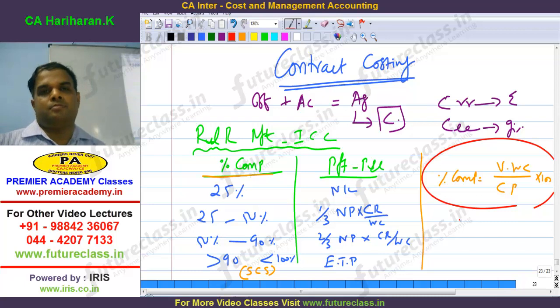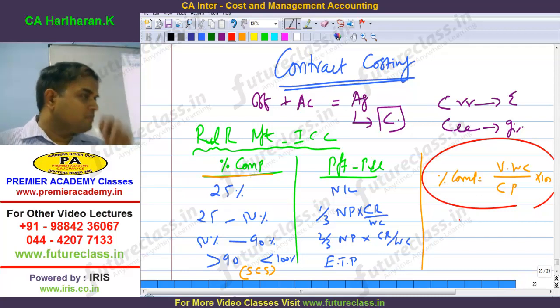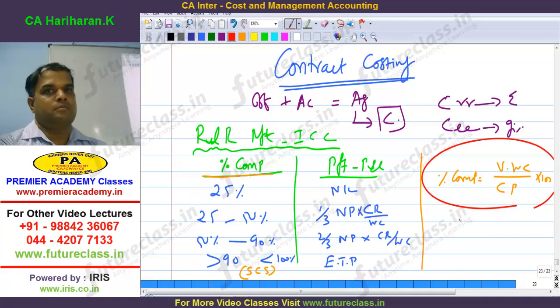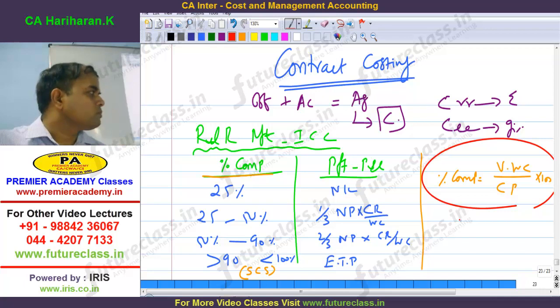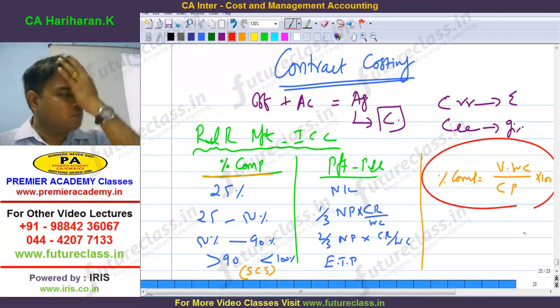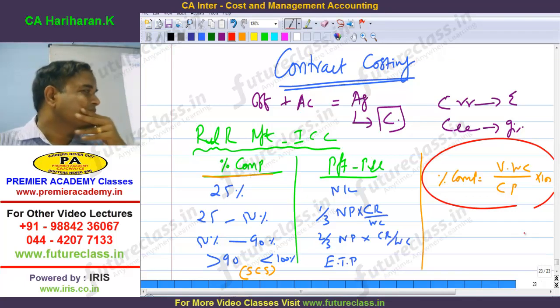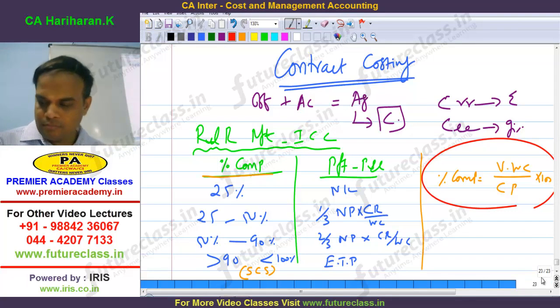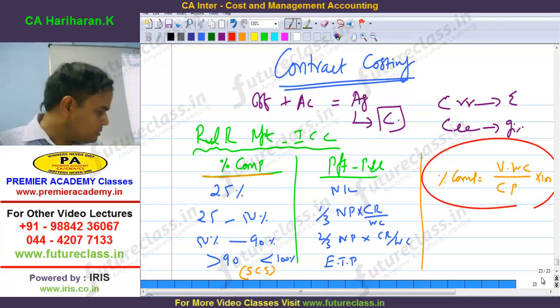B and company incurred the following on a contract still unfinished on 31st December. Contract value is rupees 3 lakhs. Materials rupees 80,000. Wages 70,000. Direct charges 50,000. Rupees 2 lakhs was received from the contractee, being 80% of the work certified. Find out the profit to be credited to P&L account if the cost of work still uncertified is rupees 10,000.